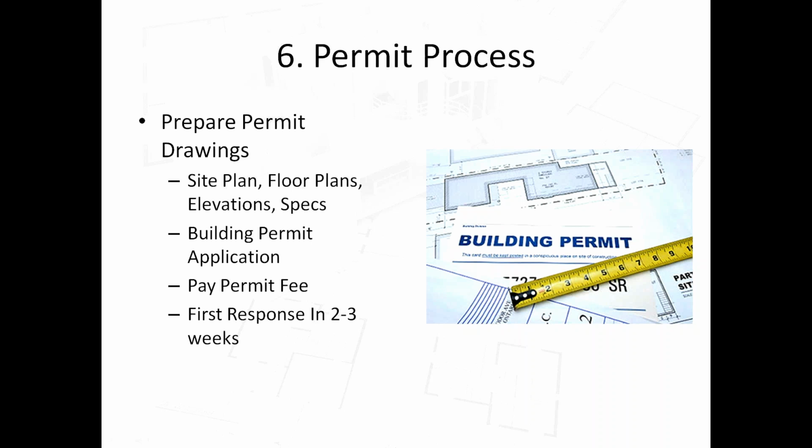Okay. Sometimes they will ask for elevations. Sometimes they'll ask for cross sections to make sure we have the proper height. And lately, I've even had to do details to prove proper fire separation and proper details for exterior walls for extra insulation. So it seems like a little bit of a moving target with a lot of these cities. They want to minimize their liability and they want to make sure that you meet the code. So I'm finding that the more I'm doing these, the more detail they're asking for.